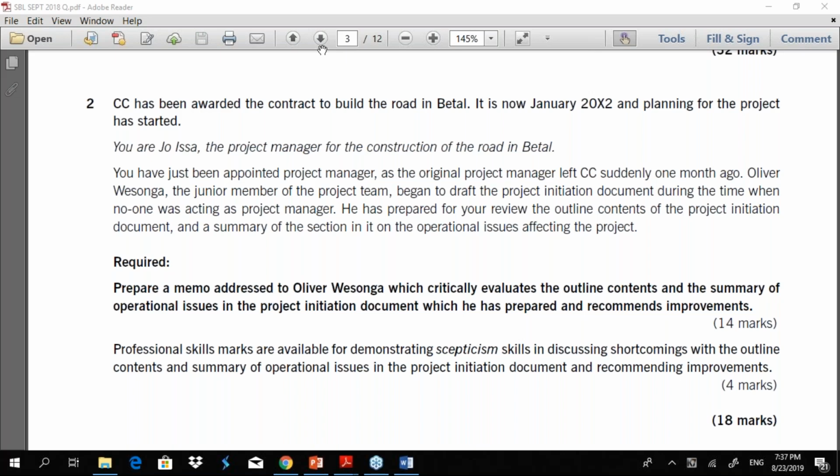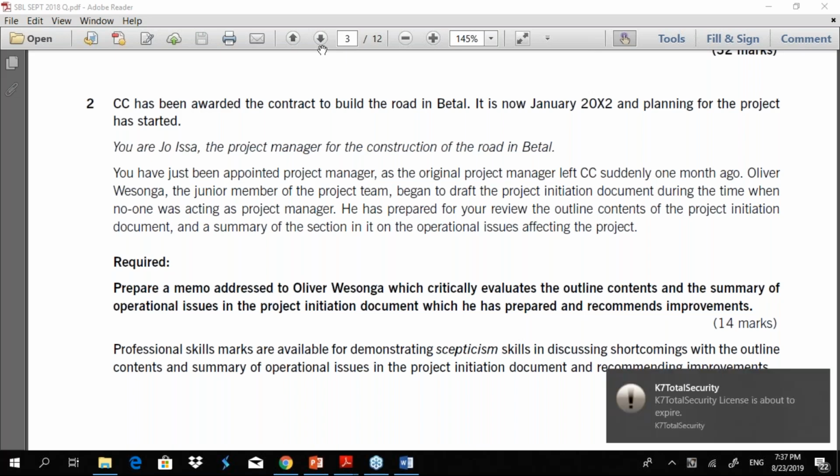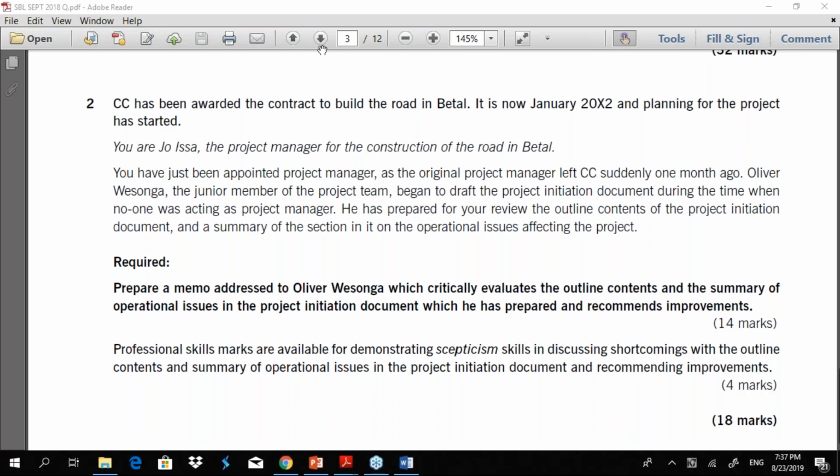And if you look at a business case document or a business proposal, it is more of a high level document. It will help you to gain investor confidence, request funds, and talk about the project at length from many different fronts. Whereas a PID is more operational than a business case document or a business proposal. So a business case document is there to gain project approval, whereas a PID is aimed at ensuring that an approved project is successfully completed.